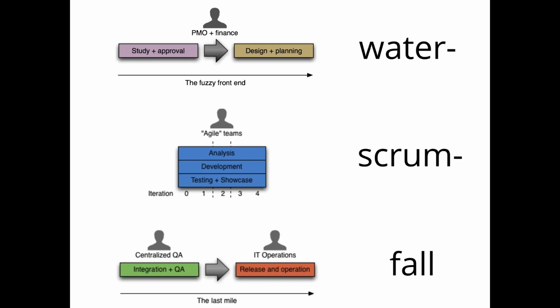And what I'm pointing out here is that even if we're doing software development iteratively in nice iterative cycles, typically the value stream to go from an idea for a new project or product or even an enhancement to an existing one, we have to go through this quite long and painful process. Firstly, we have to actually put together a business case, then we have to get the business case approved as part of the budgeting cycle, then we have to go and design the thing that we're going to build and do often detailed requirements gathering, and then we start development.